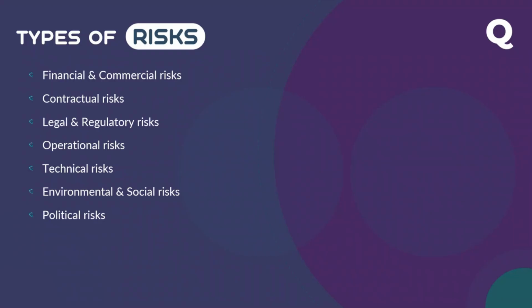Because imagine you are a contractor, there is one more contractor working there, and he comes and damages you. How are you going to cover that risk? Not just physical risk I'm talking about. If that contractor causes consequential, incidental, or any other punitive damage, how are you going to clear that? How will the contract indemnify me from those risks? That also you have to check.